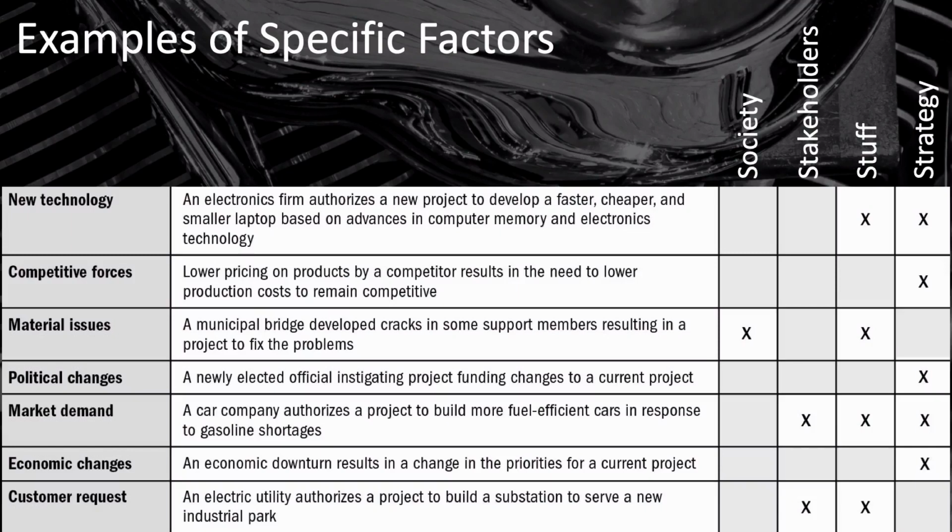With that data in hand, it was easy to say that the project was worth about $1 million per year. The total project cost was less than $1 million, so it was clearly worth it. This information helped the sponsor justify the project and may have kept it from being delayed or canceled before it was finished. This is just one example of how important a needs assessment is to the success of a project.